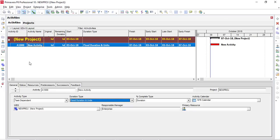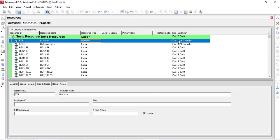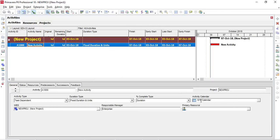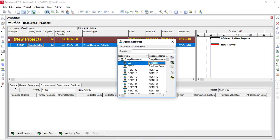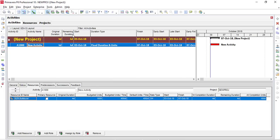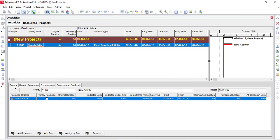I created this activity. Let's go to resources and check this bulldozer — it has a calendar of 10 hours per day for six days a week and a productivity of 400 cubic meters per day. Let's assign this dozer to this activity, which also has a calendar of 10 hours per day for six weeks. I'll add the resource and choose the dozer. The original duration is set to 4 days.